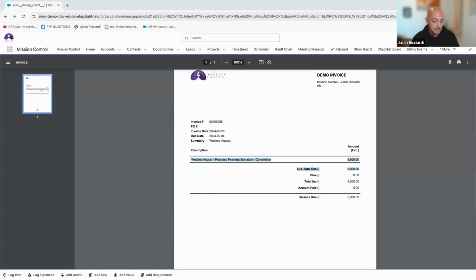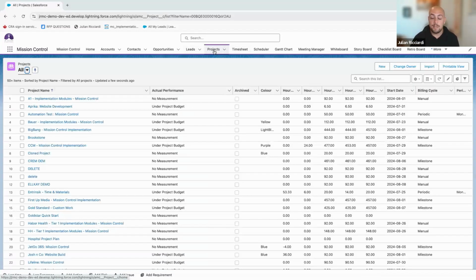So yes, we can. In terms of tracking their availabilities, if they offer you a certain period of the week, your resource's availability would be based on every resource having their own schedule or availability. So let's say you're only working Mondays for 4 hours, and you want 100% utilization. Basically, you're looking to fill those 4 hours every Monday. If you're working 4 hours every day of the week, that's 20 hours a week.